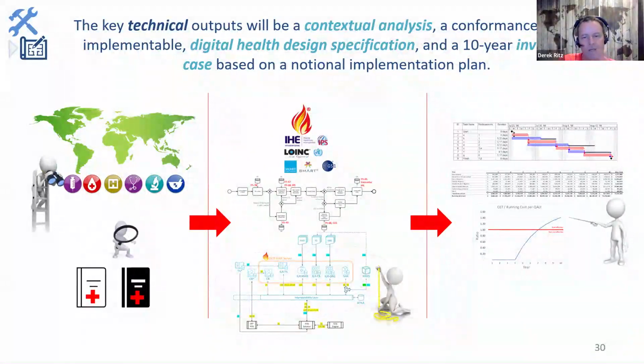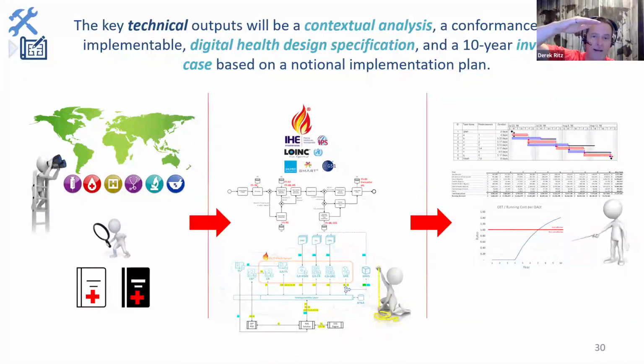In the middle, we do the work of saying, okay, I want to be able to embrace international best practices, and if I can do that, I mitigate risk. And there's this kind of hierarchy, and it's actually the one that Canada Health Infoway adopted in 2001. As the first preference, we want to adopt international best practices. As a second to that, if we can't just adopt it out of the can, we want to be able